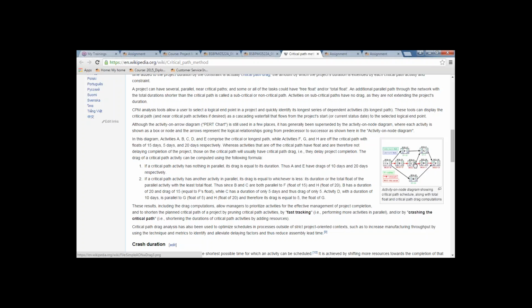The ones in the middle here are relying on the other ones to be completed before that stage happens. So A might be order paint, B might be paint. You can't paint before having ordered and received the paint. So there's a certain order that some things need to happen in. Other tasks are not reliant on that order, and therefore they don't need to be in what we call the critical path.